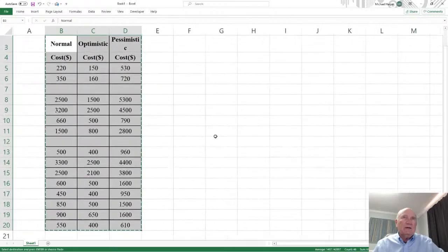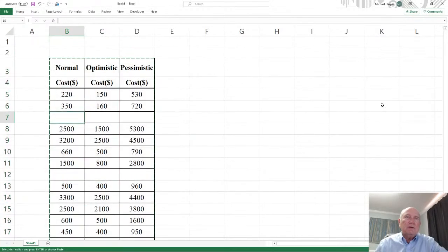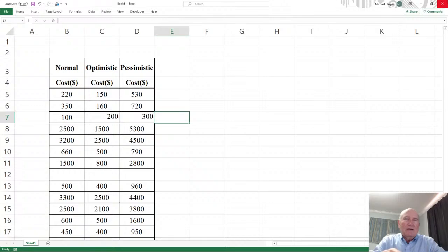And all we're doing here, okay, is let me put a number in here. Let me put a 100, 200, 300. Okay, and so that's not there. So what's going to be? So that's going to equal. Well, that's symmetric. That's not fun. Let's make 100, 200, and let's make this 500. Okay, so it's skewed. It's skewed to the larger side, the pessimistic side.